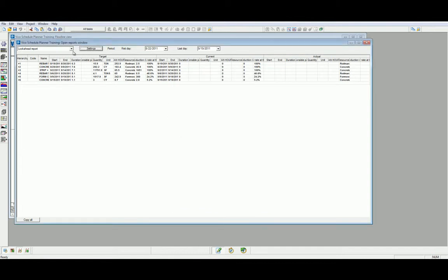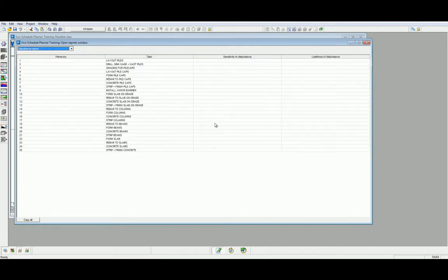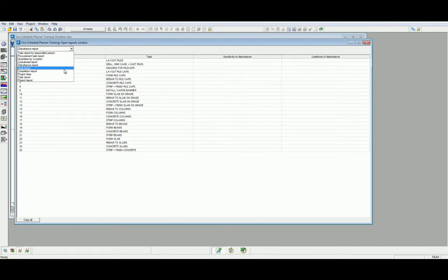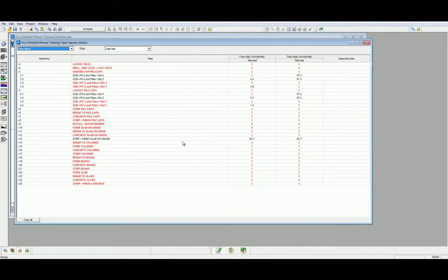Our next report is the Disturbance Report. Disturbance Reports are a filter of our risk analysis which will be covered in a later schedule planner level. This report highlights the sensitivity and likelihood of disturbances by task. Our next report is the Float Report. This is a great way to summarize the total free float from our schedule by task.